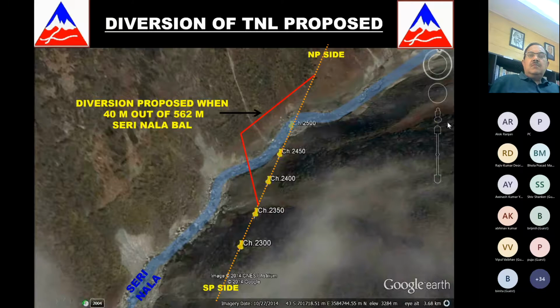At this time somebody suggested that we should divert the tunnel. Thankfully, by this time we were sure that if we do proper sequential excavation under pipe roofs, we will still be able to go through. Had we diverted the tunnel with a kink, it would have been a ventilation nightmare, because this was a traffic tunnel and vehicles were supposed to go in. It would be very difficult to ventilate a tunnel with such a turn inside.